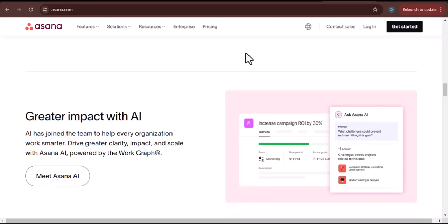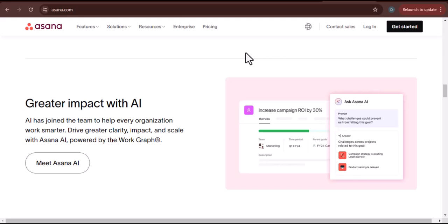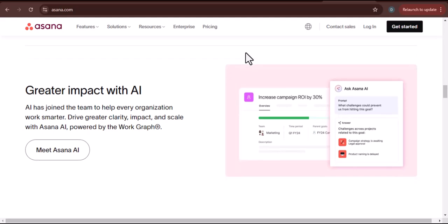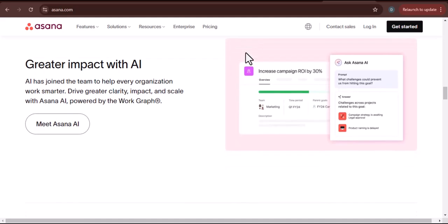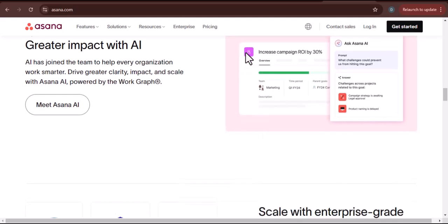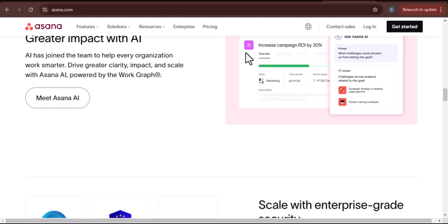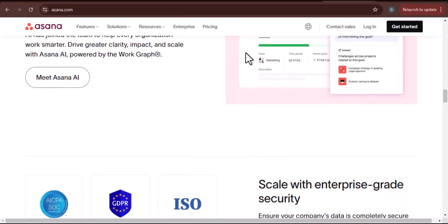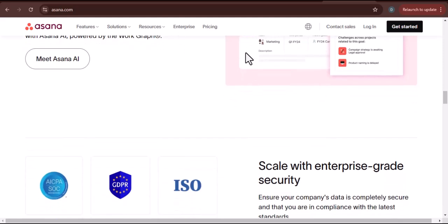Now imagine this. You're creating a new task for a marketing campaign. You assign it, set a deadline, and right there, you add an estimated cost of $500 for a sponsored social media post. When the invoice comes in, you update the actual cost field. This simple step is revolutionary. It ties the financial reality directly to the work being done, eliminating the need to cross-reference with a separate spreadsheet. But this is just the beginning.